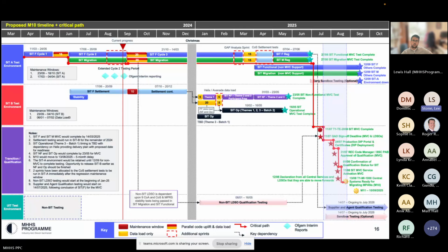So I proposed it. So that and P432, which pinned to M14, were milestone driven. So yes, they do. So any underlying logic that exists like that in the current plan, we would retain. It's a really good consideration, and we'll make sure we capture that as a clear assumption and call it out. But yes, that would move. Those two examples would move with the associated milestones. Cool. Thanks for the update.